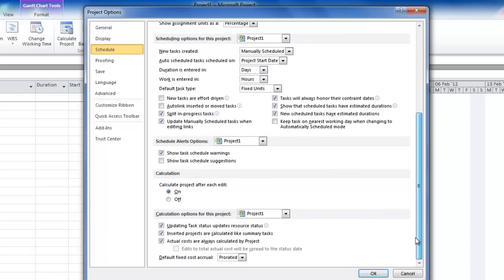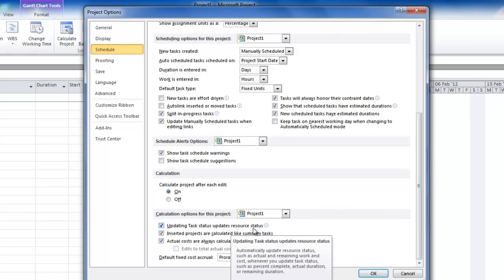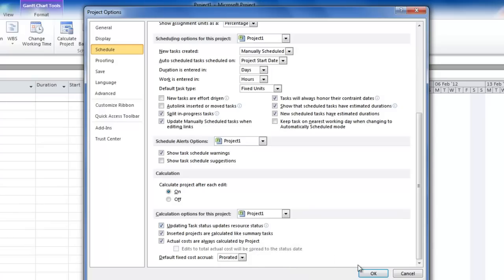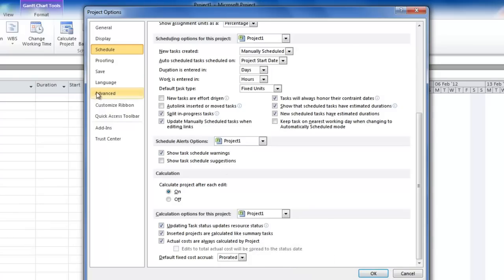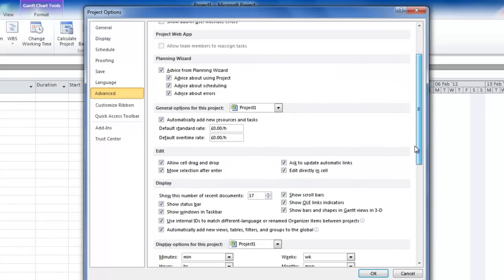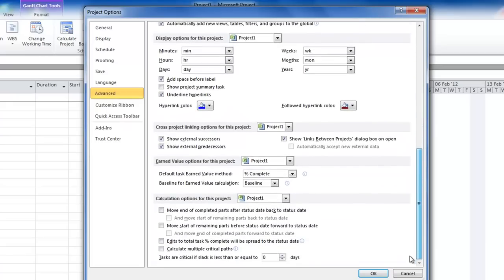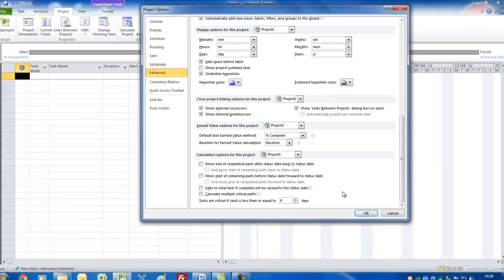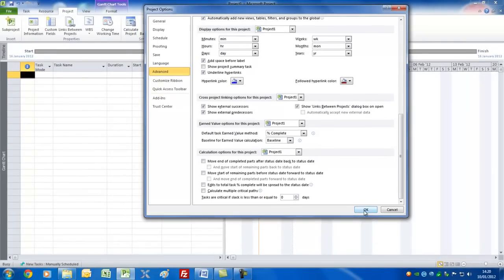Pretty much everything else you can leave as is. I like to check this 'updating task status updates resource status'. That way, when you put a task at 20% complete, it'll adjust the work ratio to the same amount. There is an Advanced tab here. I suggest you leave most of this as it is. You could set a default rate for your resources in terms of how much they're costing you per hour. But other than that, you can pretty much leave this as it is. Let's press the OK button.